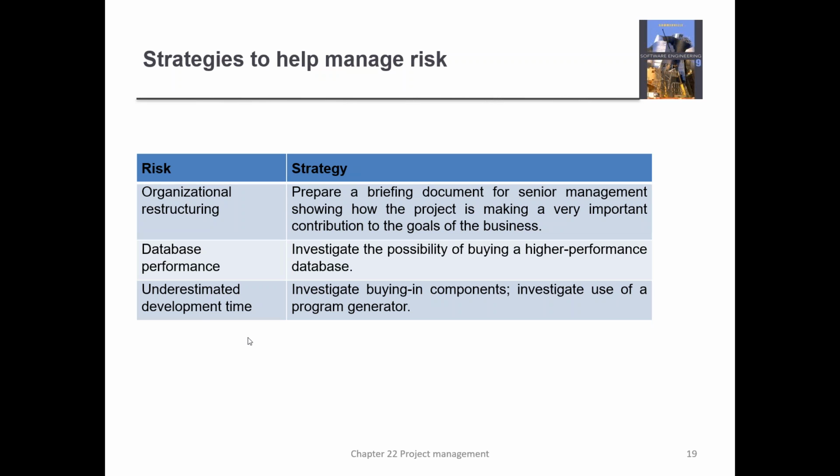All right. Development time. Now, if you underestimate the development time, as it says, you may need to look at buying in components. All right. And investigate the use of program generators. And this will help you out if you recognize that your team is not able to do the programming part of it fast enough.